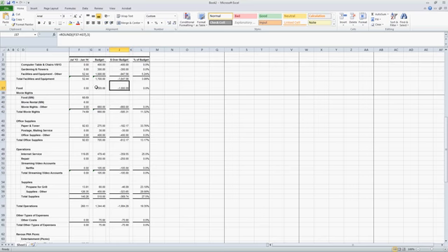So we're going to put in $1,200. That changes. So now $1,200 has been spent on a $1,000 budget, and it says we're over budget by $200, and we've spent 120%. That's how you test whether your conditional formatting is working.